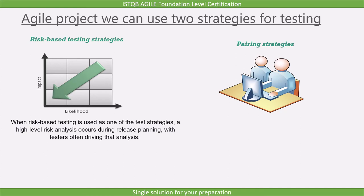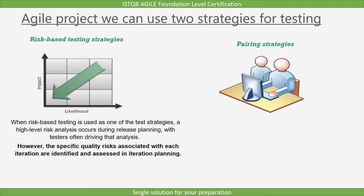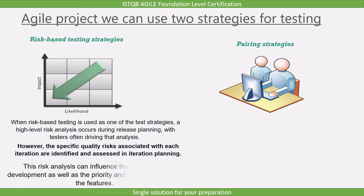When risk-based testing is used as one of the test strategies, a high-level risk analysis occurs during release planning, with testers often driving that analysis. The specific quality risks associated with each iteration are identified and assessed in iteration planning. The risk analysis can influence the sequence of development as well as the priority and depth of testing for the features. It also influences the estimation of the test effort required for each feature.